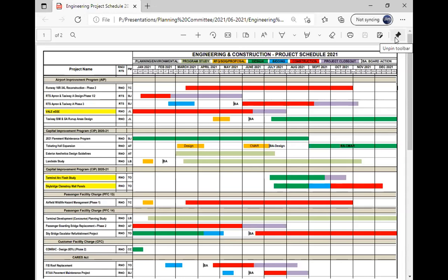Here to discuss our schedule for this month and update you on what's highlighted here, the Vail. The reason that changed a little bit on the schedule is, you remember last month you approved our change order for moving the charging station, which has extended out the closure. We're hoping by the end of this week to begin the actual commissioning on the chargers with United and Southwest and finish up the movement of that charger. And hopefully by the end of the month it's going to be done and we'll be working with our FAA partners to close that project out.